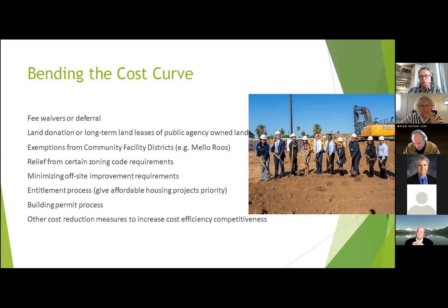Know the cost of any of the off-site mitigations, any of the on-site mitigations, and help us figure out ways to resolve these costs. You know, the average stormwater retention on any development we do is somewhere around $800,000. Is there a better way to do it than retaining water on a site that may or may not be maintained for the life of the development? I mean, you can just begin to think about things that can be done.